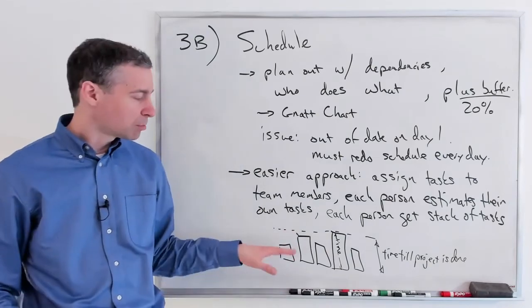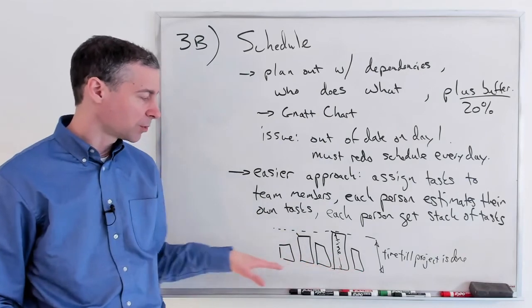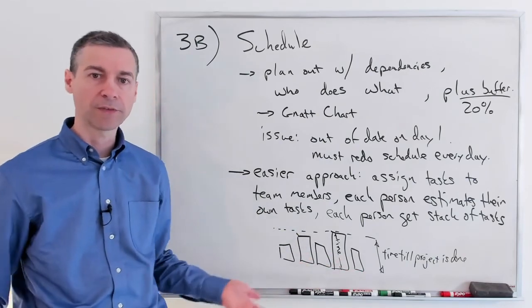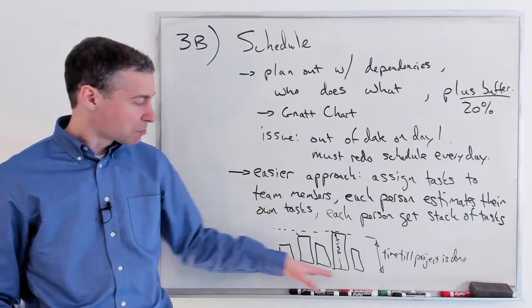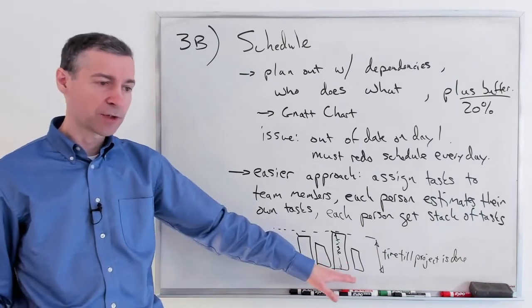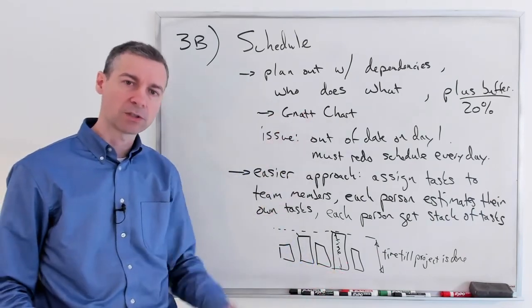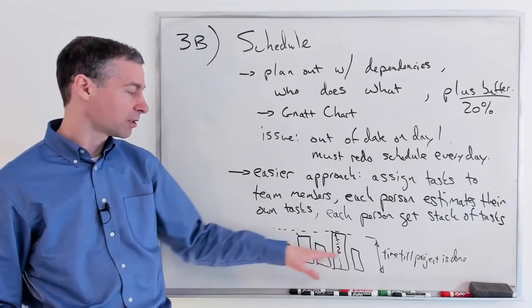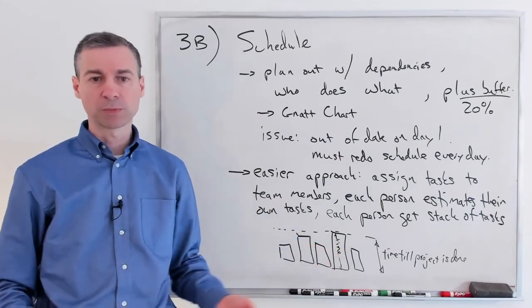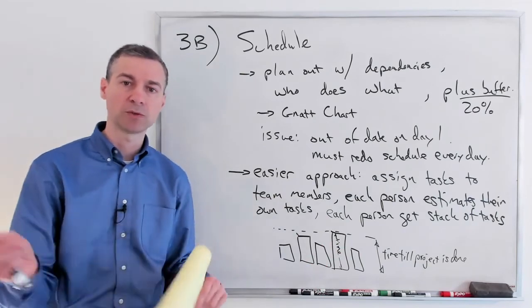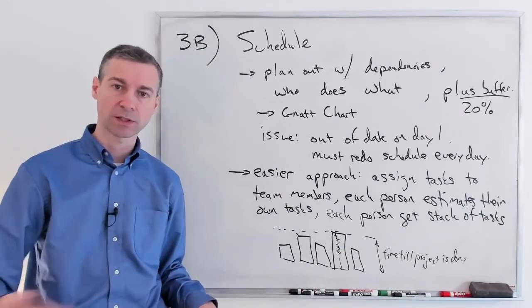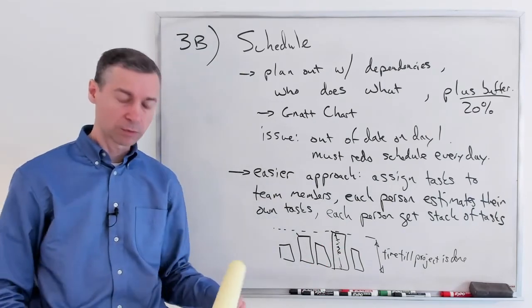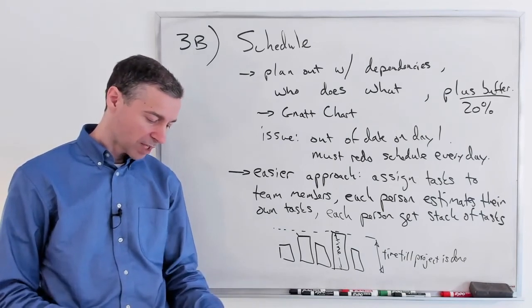We didn't need to plan in advance that one person would work on one thing or another. Now, this might be a little bit more comforting to know, oh, these are all the things I need to do and I'm going to work through them. But at the same time, we always keep in mind that, yes, you're falling behind schedule. We're going to move some of your tasks to other people so that we can load balance the work again.